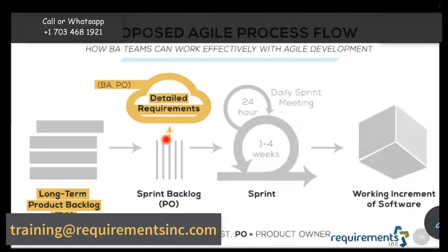If the next one is simpler than this, then that's a 1. If the next one is more complicated, then we'll figure out if it is a 3 or 4 or 5 or whatever. This is one way to look at it, so that you pick up a story, you're not thinking hours, but you're thinking days, or you're thinking about it as a relative. Is this more difficult than the previous one, less difficult than the previous one? Got it?